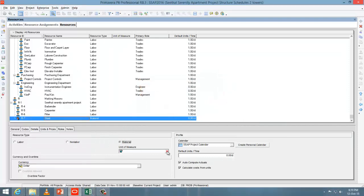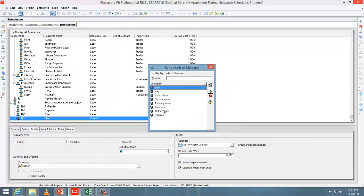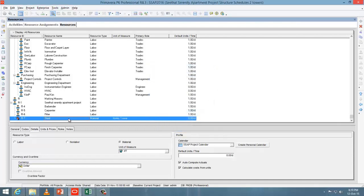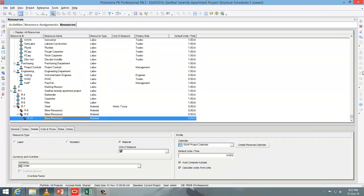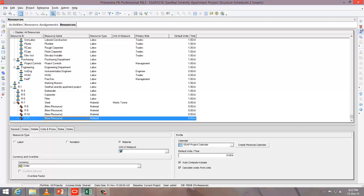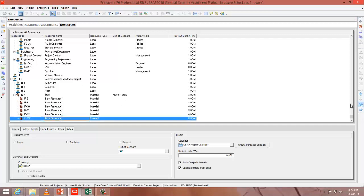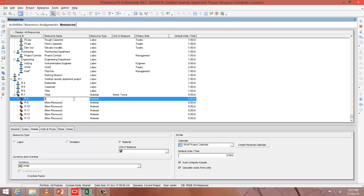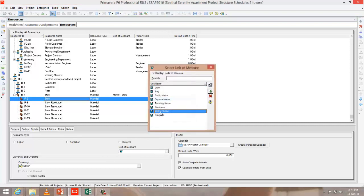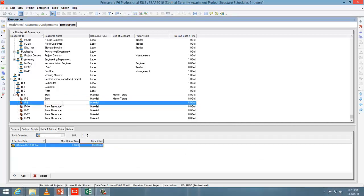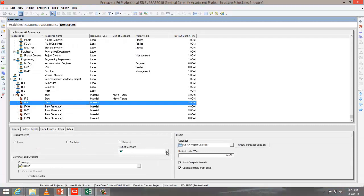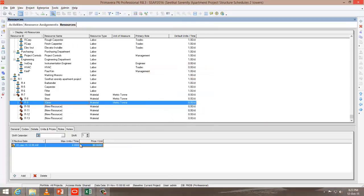After that, go to unit and measure and change its measurement unit to metric ton. Press add again. You can create more material under steel. Under steel, I'm going to add 8mm dia. It's material — change unit of measure to metric ton. Go to units and prices and change its price. For materials, you don't want to enter maximum units per time, just enter its cost and the unit of measure — it's metric ton.